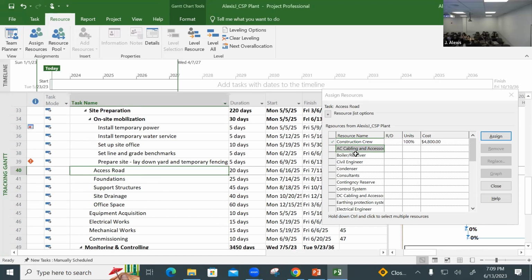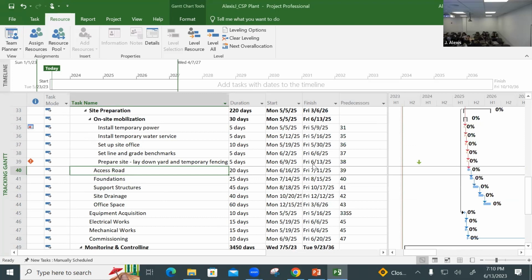So I select access wood, and in contingency reserve, I type, let's say, 60 grand, right? And I close that. I didn't finish yet because I have $500,000 as reserve, and I need to make sure that I spread it throughout the project. Even if I don't use them exactly where I predicted that I would use them, but at least I have reserve, right?